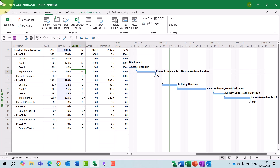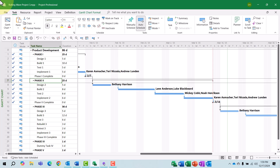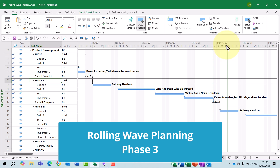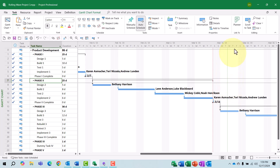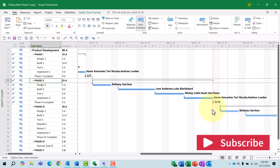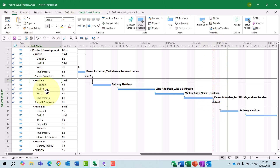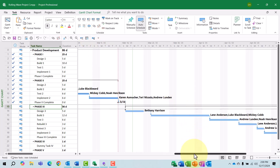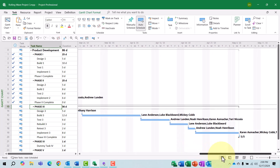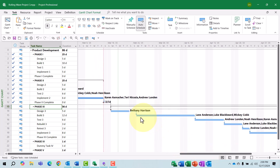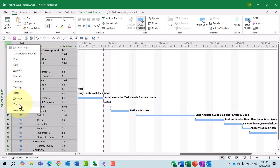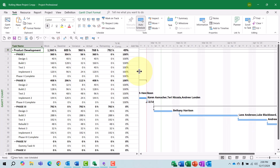Let's do that one more time just to make sure you get how to do rolling wave planning. Now let's jump ahead again in time. Today is Wednesday, March the 19th, as indicated by the green grid line in the Gantt chart screen. The status date was set to last Friday, March the 14th, as indicated by this red dashed grid line. Notice also that all of the Phase 2 tasks have been completed, and all of the tasks in Phase 3 are now completely planned with resources assigned to each of the tasks. I'm now ready to baseline the Phase 3 tasks. Before we do this, let's go to the work table and take a peek at work variance for this project.